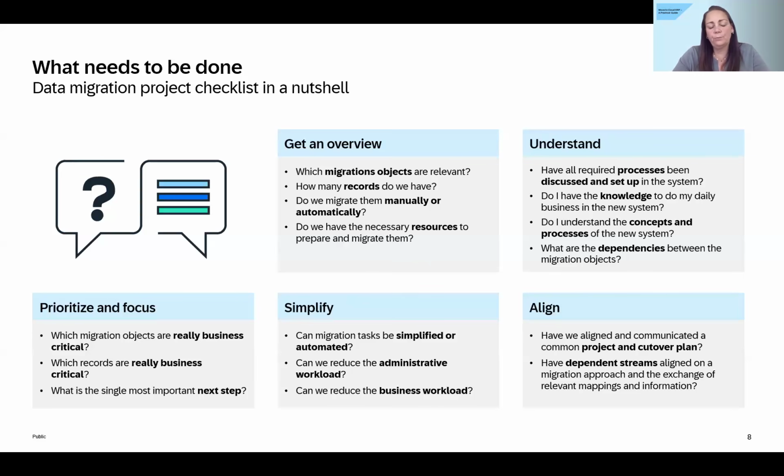Try to reduce your workload, even on the administrative side or on the business side. And also very important, include all stakeholders. Align with them, set up an early project and cutover plan, and bring together all the dependent streams, so that you have a well-aligned project plan ready when you start your data migration.